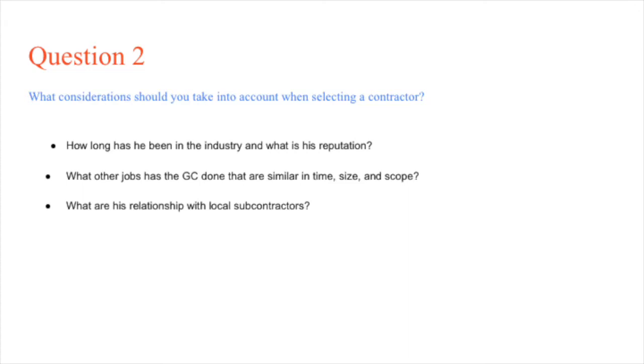Fifth, what other jobs has the GC done that are similar in time, size, and scope? Sixth, do you have enough field personnel to support this large of a project? Seventh, what are his relationships with local subcontractors? And eighth, does a project of this size have the ability to have financial backing?